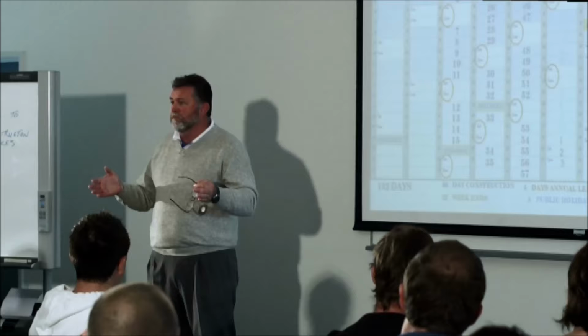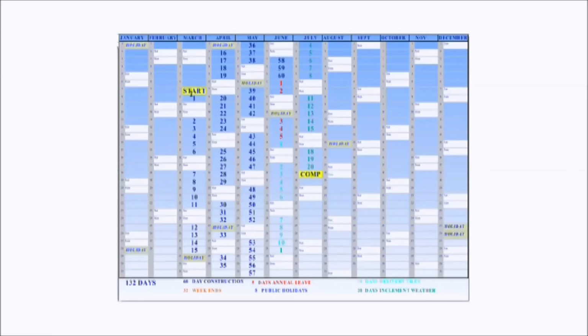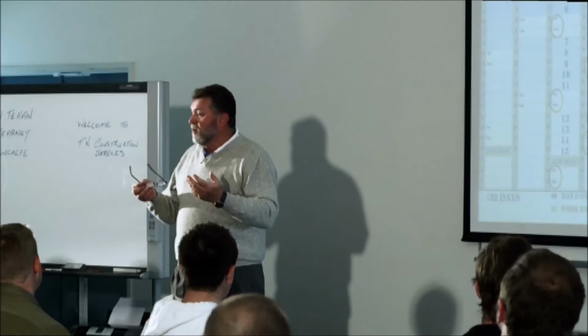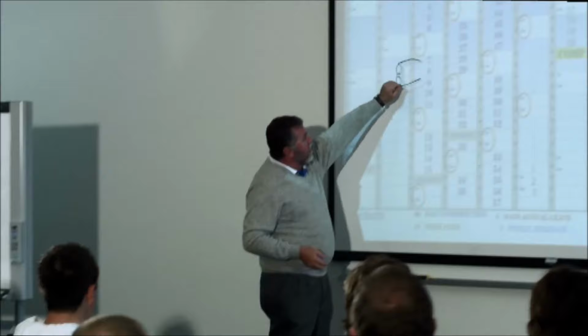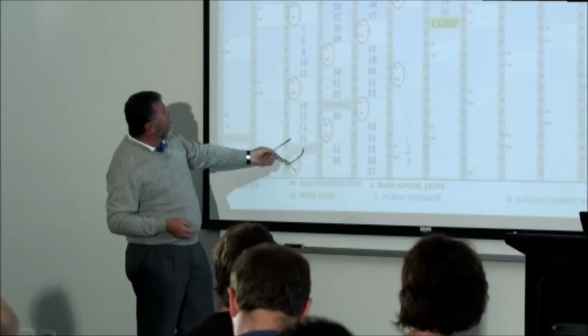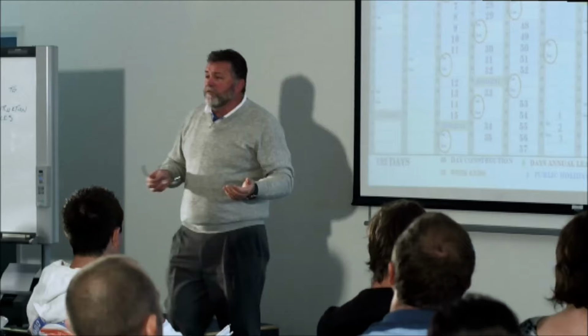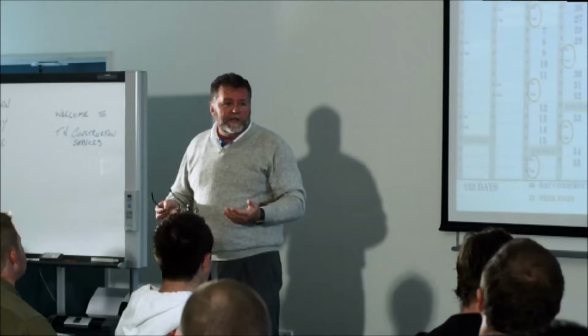The idea is to say, okay, if I get this job, when can I start? Not actually saying on that exact date, but I know that this house or this job, especially renovations, as everyone knows, renovations are probably the hardest thing to determine, is saying, okay, I reckon I can get it done in, say, 16 weeks. So the 16 weeks are the Mondays to the Fridays. I've got four public holidays, 16 sets of weekends, and in that as well, you might have your wedding anniversary and you're going to take your wife away for a week's holiday. So all the delays need to be included.